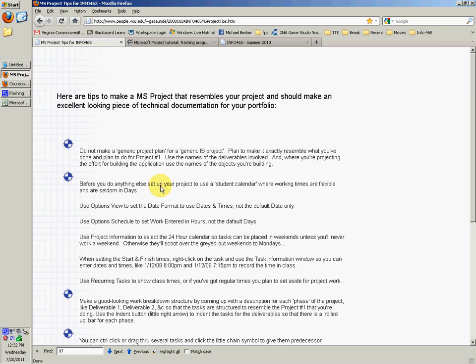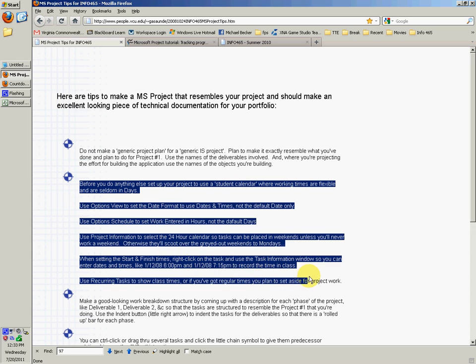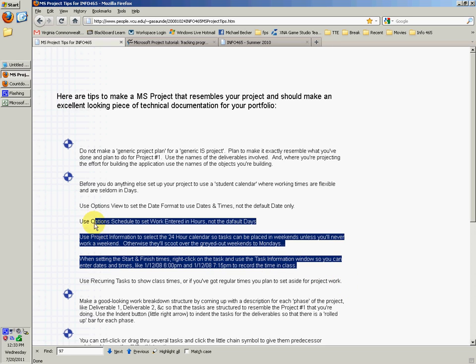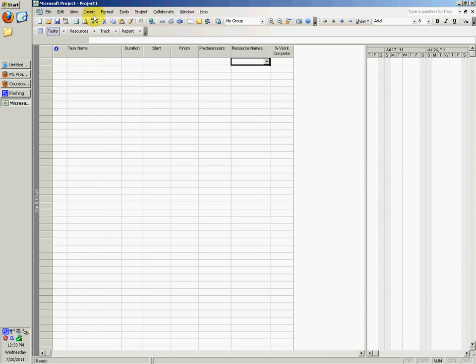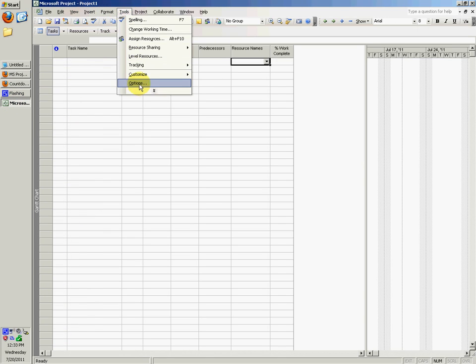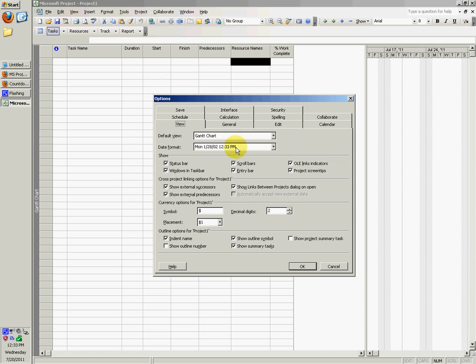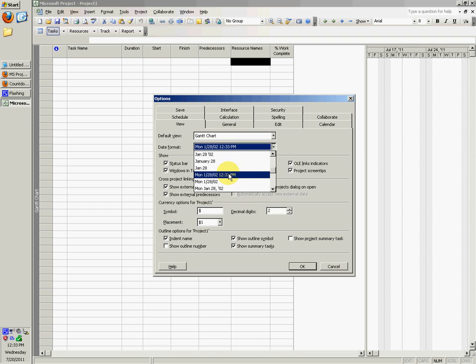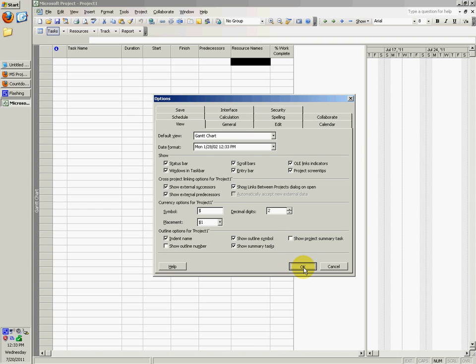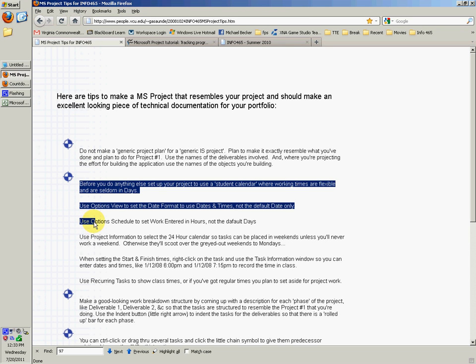Before you do anything else, set up your project to use a student calendar where working times are flexible and are seldom in days. Use the options view to set the date format to use dates and times, not the default date only. In MS Project, go to Tools, Options, View tab, and choose the date format. By default it was at this, and you want to change it to something like this.